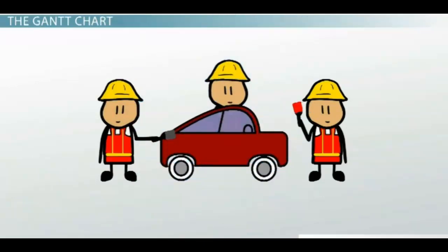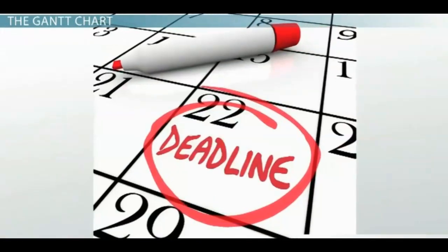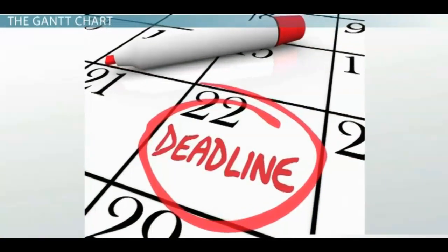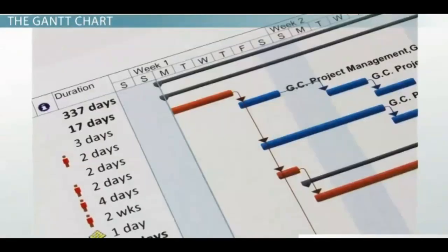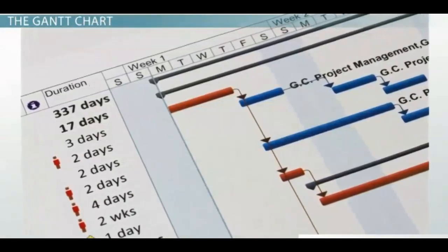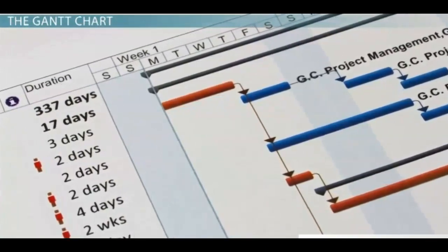Once the terminal and summary elements are defined, a manager can then add projected and actual projections for completion of each of those elements. The time schedules are plotted on the graph using bars. These can be used to come up with deadlines. Once plotted together, it becomes easy for others to understand the individual work tasks and their due dates within the greater project deadline. This also demonstrates areas that can be done concurrently with other tasks and what tasks are dependent on the completion of others.